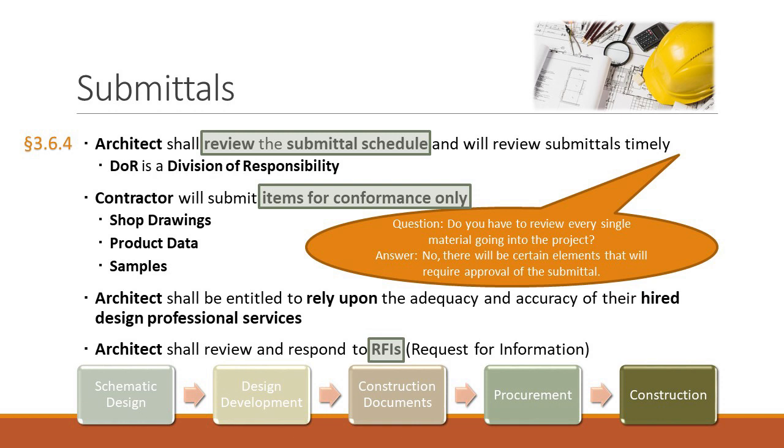I'll give you an example. Many, many years ago, there was a collapse out at Rosemont of the concert hall or whatever, and it was a huge deal. And the architect had gone out and done inspections, and the architect got sued because they felt that there were design errors. Well, it turned out there weren't design errors, and in fact the contractor had done improper shop drawings, and as a result of the shop drawings, the way it was built created a structural instability. Well, the architect reviewed those shop drawings and said they looked right.